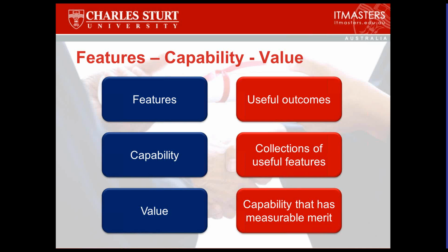It doesn't mean you won't fly anybody, but it means that if you're going to take advantage of a geographically dispersed team, and there are advantages, I mean, you wouldn't be talking about it if there weren't, then make the investment in making the planning collaboration easy. What that might mean is that you deliberately second people from one team into another, so that if you have cultural differences between teams, for example, you have a member of that team working in the same room as a member of another team who have displaced their person into the other team, so that there's this cultural understanding. When one team is saying, well, this other team over there, why don't they do it this way?